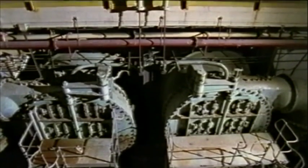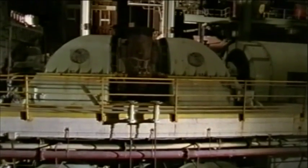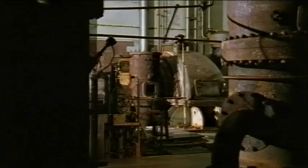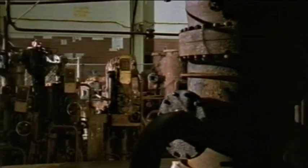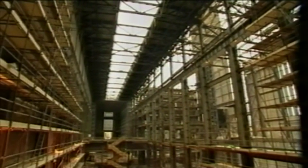In the 1950s, when the huge boilers were pushing steam through the turbines, asbestos was used as an insulator. Nowadays, a trace of asbestos in the air can shut down a building site. So when the building was handed over to the Tate in 1994, Magnox, the owners, guaranteed to the Tate that the building was asbestos-free. But when Ian Blake comes into work one morning in June 1997, he gets an unpleasant surprise. Well, unfortunately today what we've found is there's a presence of asbestos inside the building.